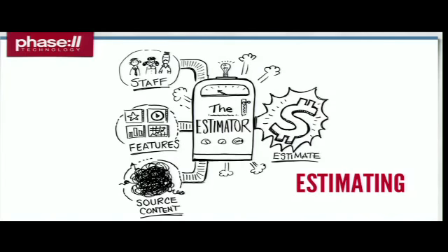What we've seen contribute to projects' failure is the internal team, the internal group that's working on the project, doesn't have the same rigor and customs and culture around doing estimates. As a result, their estimates tend to be driven more by what their project stakeholders and their project manager think it's going to take. It's just top down.